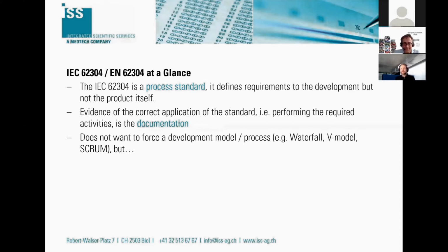The standard does mention multiple times that it does not want to enforce a specific development model, but it defines a set of activities that are in themselves dependent on the output of previous activities. So there is a bit of a chronological order to the activities. So you're not completely free to do what you want.